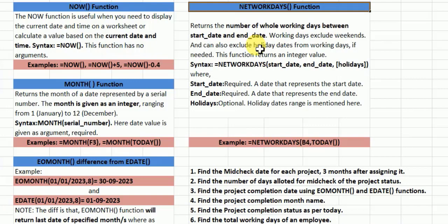This is the speciality, but while calculating the working days, it also considers the weekends, meaning it will not count working days, it excludes weekends. Yes, it won't count the weekends. This is the speciality of NETWORKDAYS.